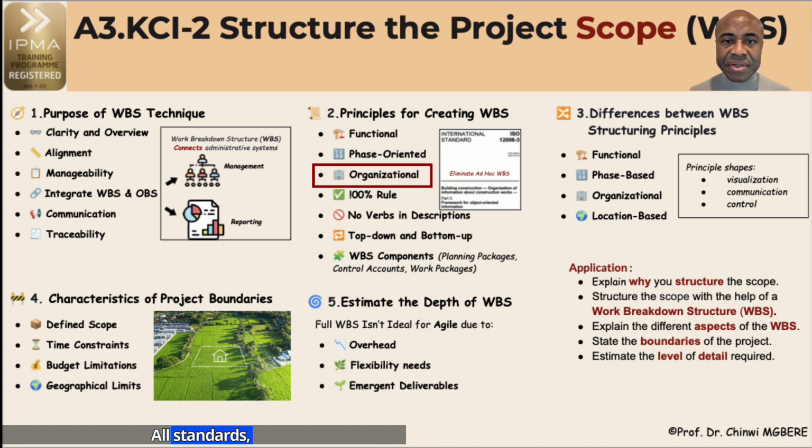Organizational standards. Experienced organizations apply work breakdown structure standards that define structure depth, control accounts, numbering schemes, templates, links to financial or enterprise resource planning systems.